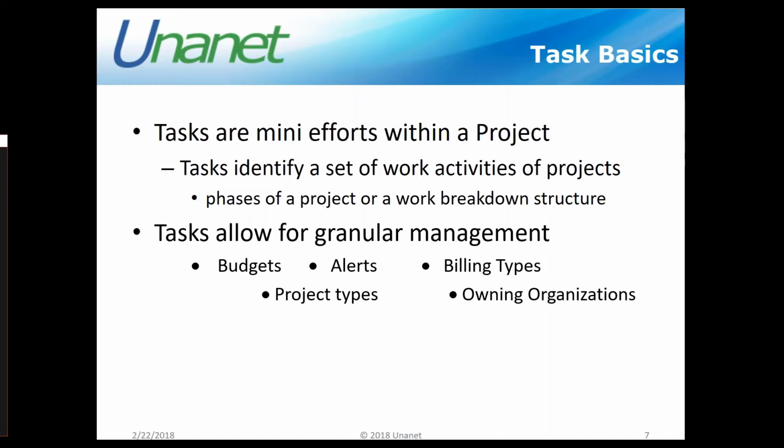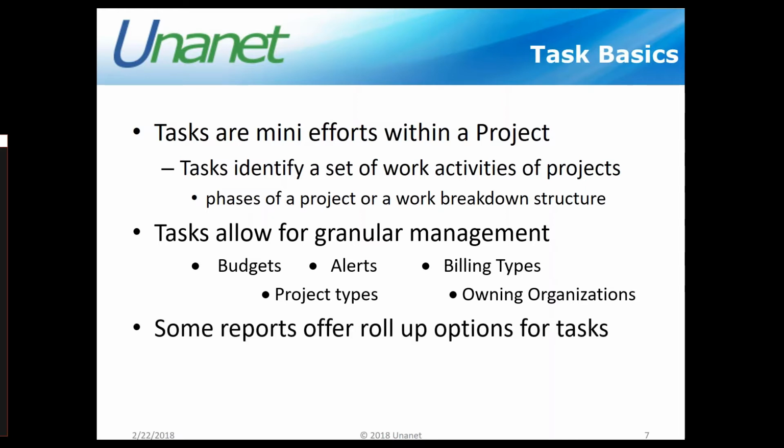One thing to keep in mind, anytime we have information in the database, we want to get information back out of the database in reference to a report. Many of our reports, if you're using tasks, have this feature of being able to roll up by your task. Even though you can see them individually broken down, which is sometimes very important to us, sometimes we may want to roll that up. So we have many of our reports that allow this roll up feature for our tasks. So that's one reason why we would use tasks.